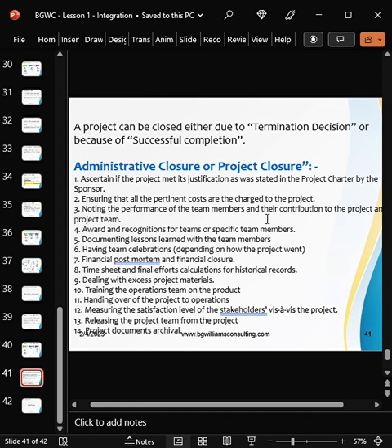This is my vision. Leave that one that you guys have done. Come to this one. This is what I want you to achieve for me. That is as a result of convenience. I don't want it anymore. So a project can be closed as a result of a termination decision, a convenience decision, successful completion, and it can be closed on legal grounds, law cases. Legal ground says close.